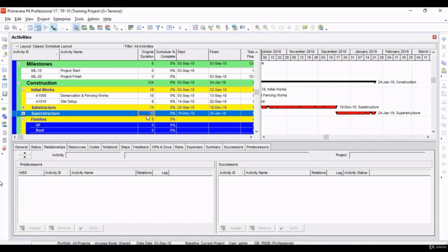Now we have only assumed the duration and productivity factors for the activities, but in superstructure we have only one slab, that is ground floor to L1 to roof, so the superstructure is taking less duration. Since in substructure we have a lot of activities, right from excavation to the whole completion of the ground floor slab, that is why substructure is taking more duration over here. This ends the conclusion of superstructure.